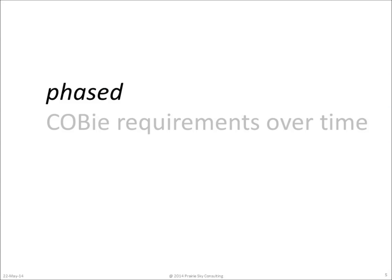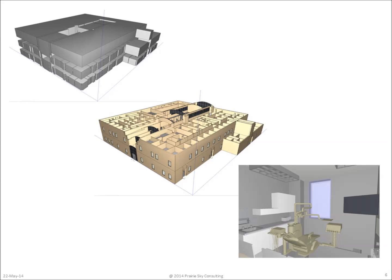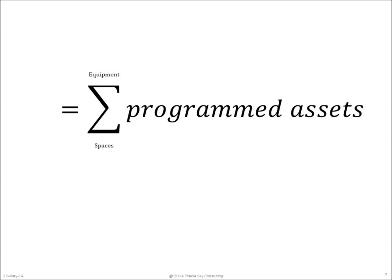When thinking about how COBE data is developed, it's important to realize that COBE data doesn't happen all at once. COBE requirements are phased in over the life of a project. During project planning, we get the blocking and stacking of the spaces within the building. During design, we get information about the rooms and fixtures. During construction documents, we get information about the specific details of the products that are going to be delivered, and then during construction, installed. So during planning, we can identify COBE requirements as being the sum of all of the programmed assets.